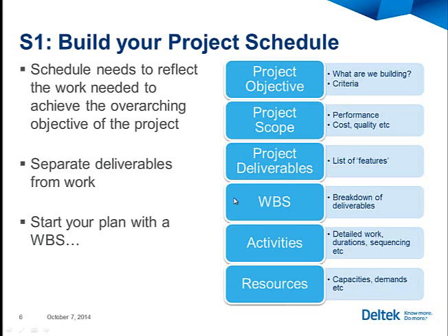The WBS, or work breakdown structure, further breaks down those deliverables and assigns them to different product-oriented areas. And then beneath that are the activities, and subordinate to those are the resources needed to do the work. This can fall apart anywhere in here. You can have the right resources working on the wrong work. You can have the right work that meets the scope of the project, but you didn't have the right resources or any resources to actually perform that work. Your company might be an expert in something, but if you're working over capacity, you won't be able to deliver for that next customer.